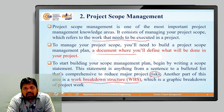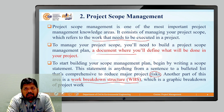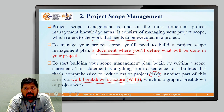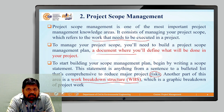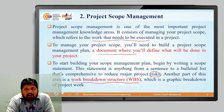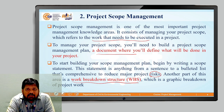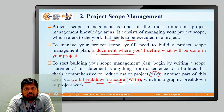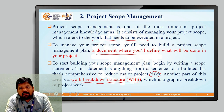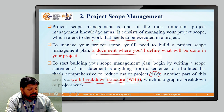When we break down any structure, the larger scopes are divided into smaller portions, making it easier to execute the project. For example, concreting is a single task but can be divided into a number of activities: material procurement, scaffolding construction, framework construction, bar bending schedule, fixing bars, mixing concrete ingredients, placing it, and curing it. All these activities are involved and can be divided into smaller parts — that is the work breakdown structure.